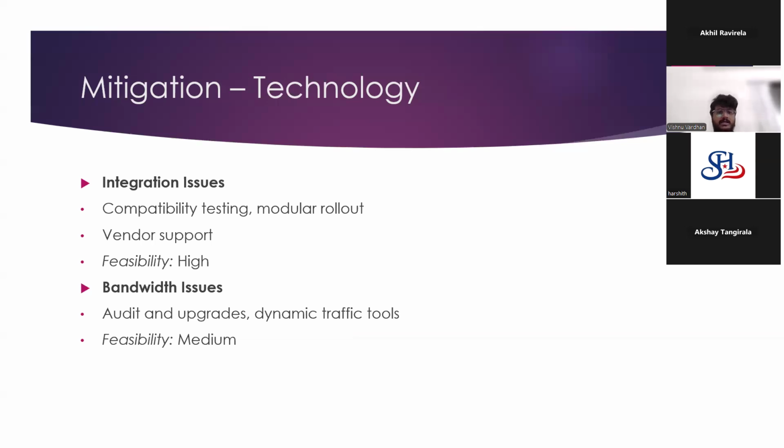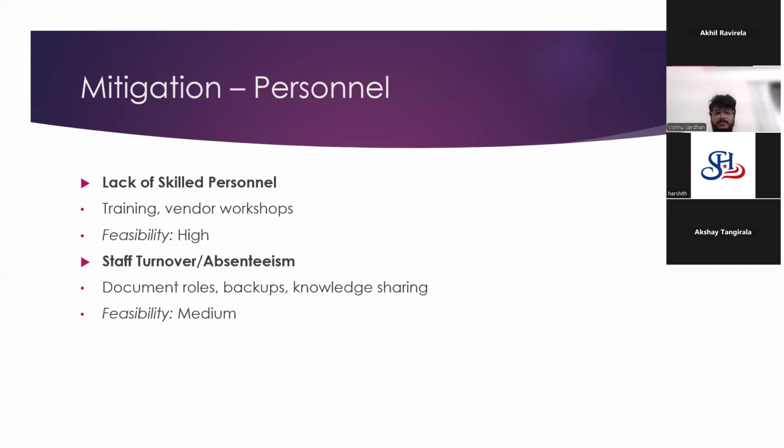Coming to the next slide, mitigation of personnel risks. For personnel related risk, upskilling existing staff through training programs or vendor workshops is key. To manage potential turnover or absenteeism, we should document key roles and responsibilities and promote knowledge sharing so that no one person becomes a single point of failure. The rest of the slides will be explained by one of my teammates.